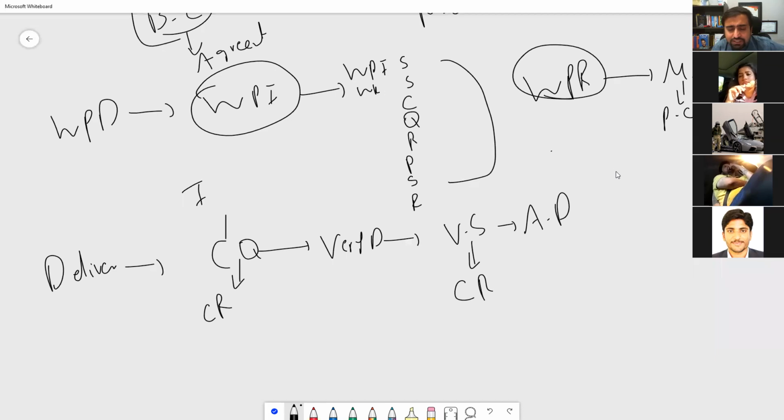Any change requested by anyone must be in written form. It goes into the change log. Then the project manager reviews whether the change is required or not. If the change is not required, he will reject it and give the reason.